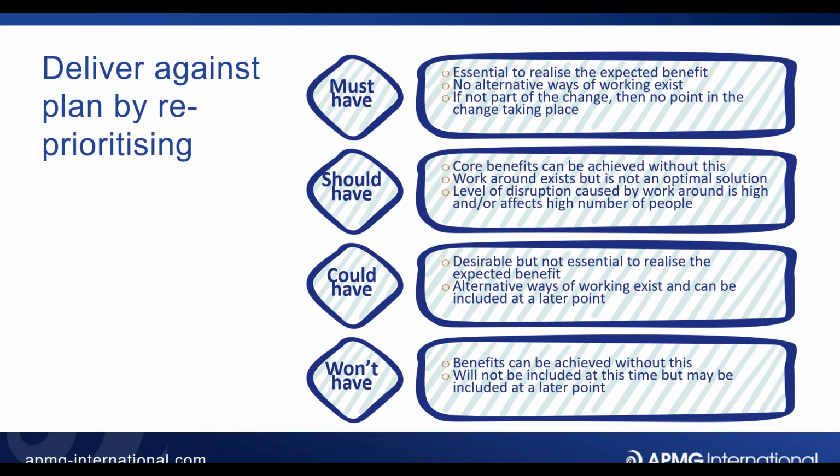And then there are the nice-to-haves, if you like. And of course, when we're brainstorming all the work, if we think that we've had some great ideas but maybe they're not as essential, maybe we'll put them in the won't-have-this-time column. This, often called MoSCoW prioritization, is a very simple way of doing it. And it doesn't matter what criteria you're using. The important thing is that everybody uses the same criteria so that everybody can take part in sharing their views about what comes first, what comes next, what we should be doing.